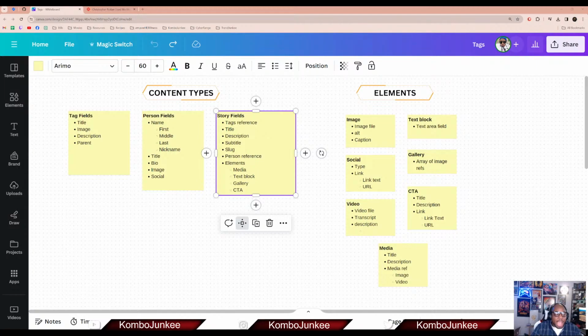Okay, so now that you have your tickets refined and you have all the items in that ticket fleshed out, like you know how to do it, now the next thing to do is to look at all of your tickets, put them up against all of your available resources in a scrum, and say, all right, let's plan the next sprint, right? Or the next iteration of work, right? And in a planning, you look at the level of effort for each individual ticket, and you say, well, I think that we can get this done, this done, this done, and this done, right?